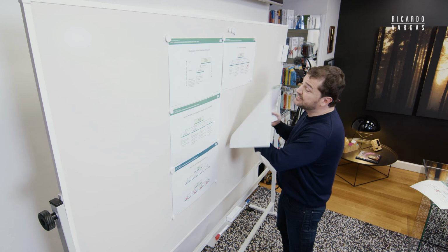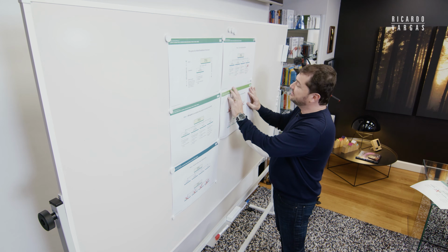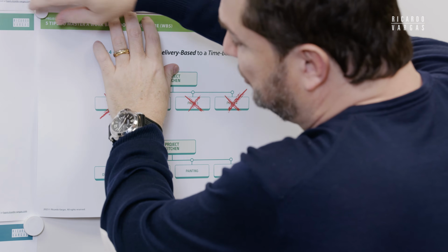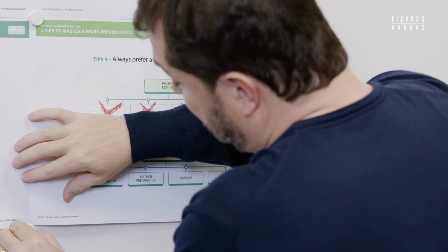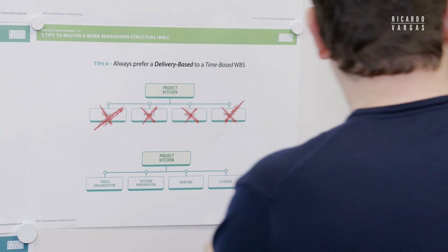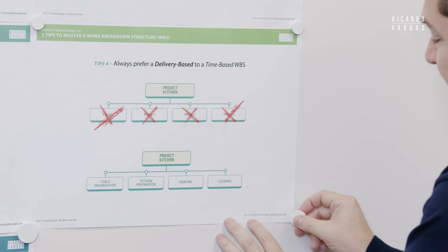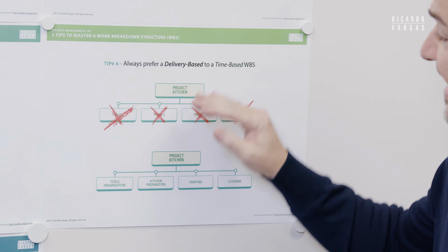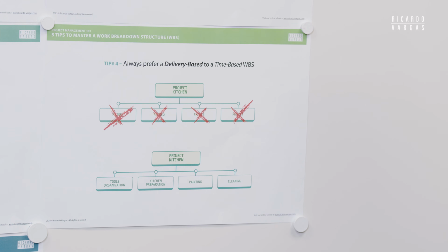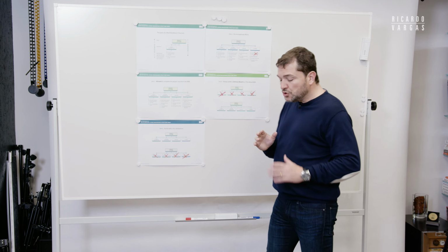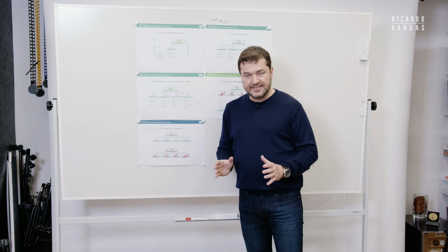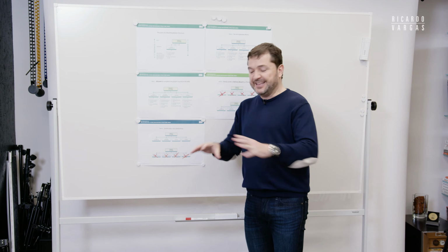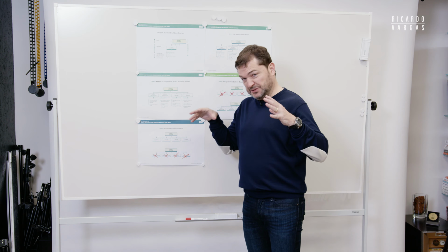Tip number 4 is a very polemic one. I saw some books and some standards saying differently, and I respect them despite not agreeing. For me, there is no such thing as a time-based WBS. The WBS is always, for me, delivery-based. What are the components of what I'm planning to deliver? And then I divide the work into these components.